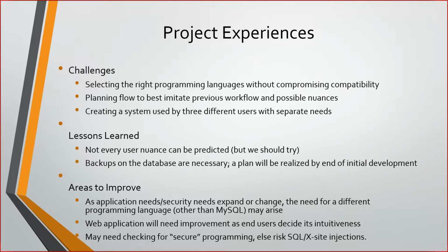Another lesson learned is that I personally didn't think about backups on the database, but they are truly necessary, especially with all the information that's going on the database. So by the time we start developing the database, a plan will have to be realized and put into place, because once we import that data, we have to make sure that it stays put and that everything goes smoothly once we transfer all the data over to the database to begin with.